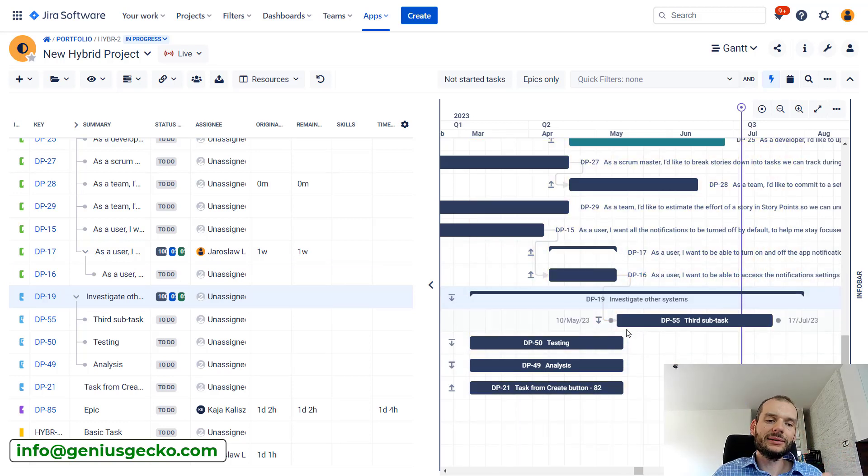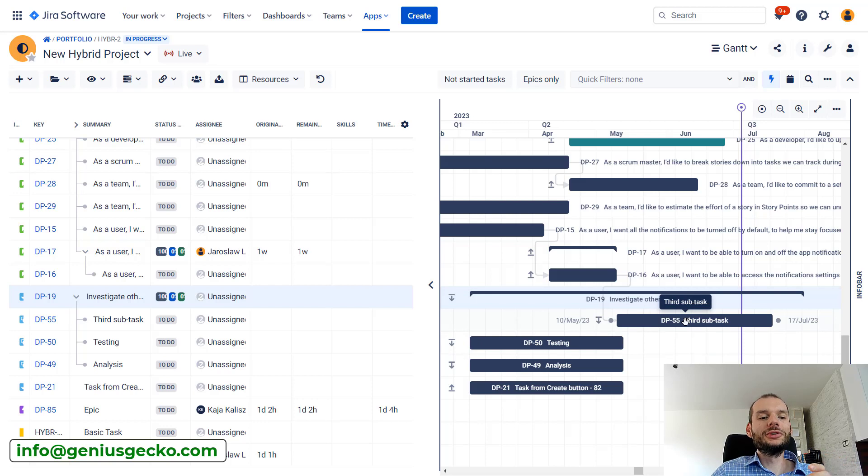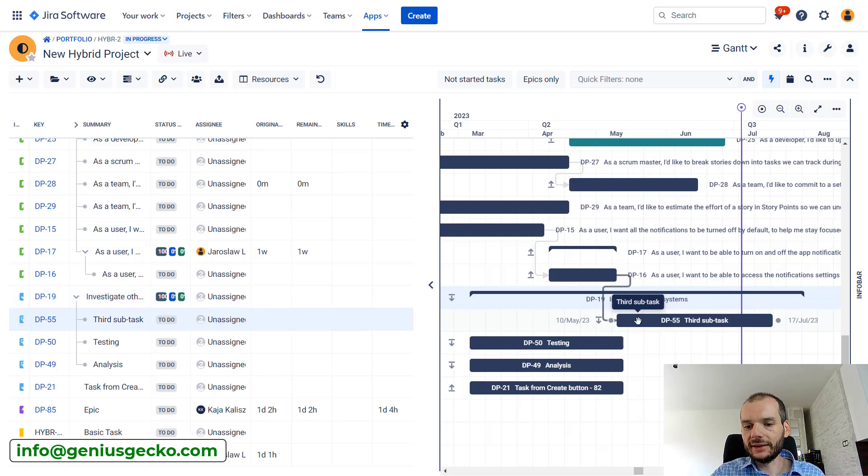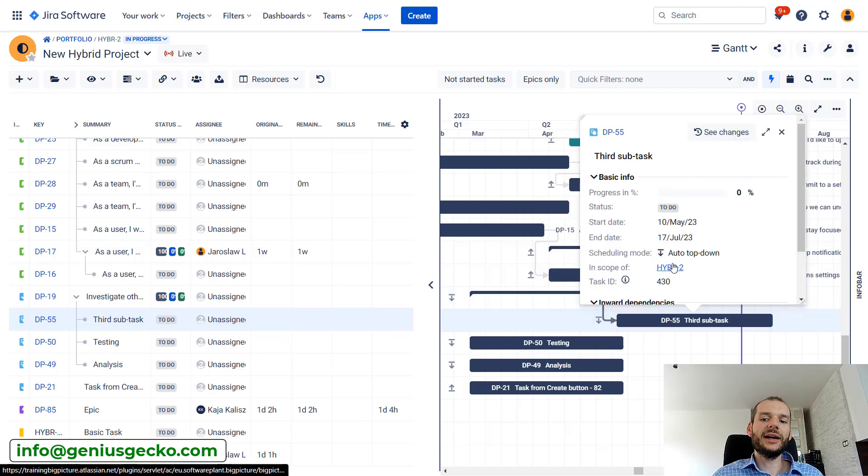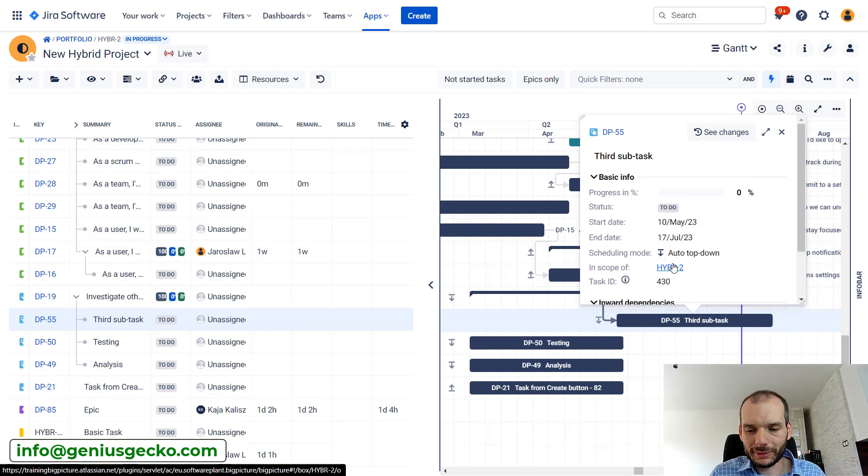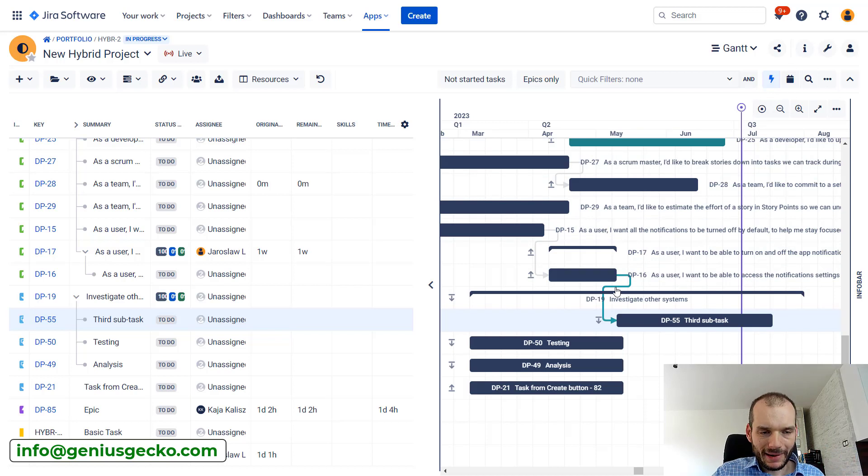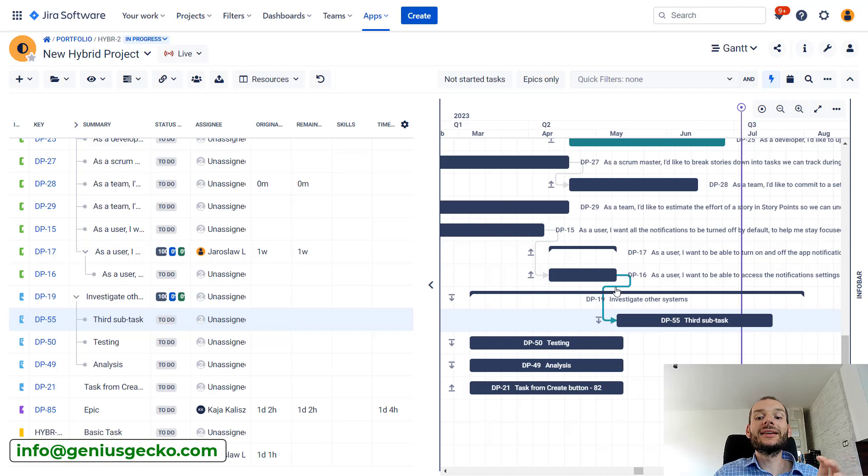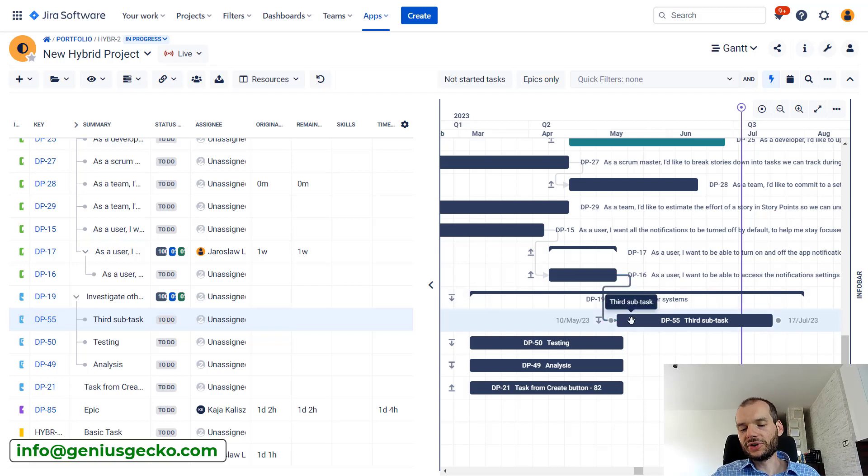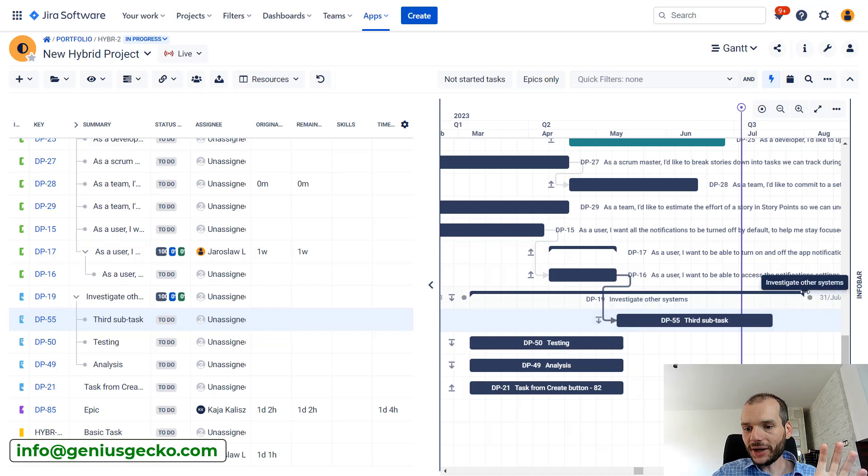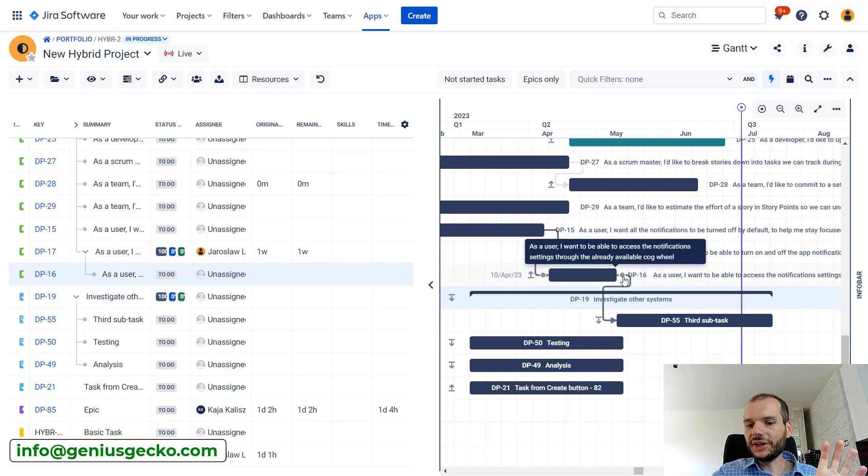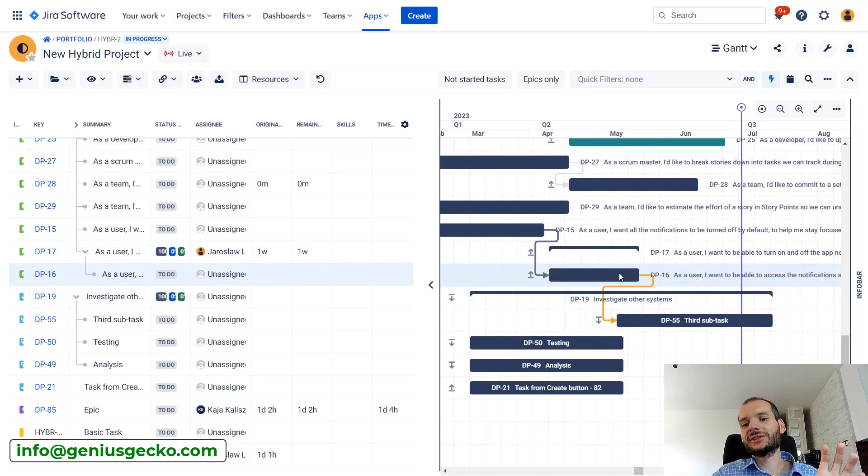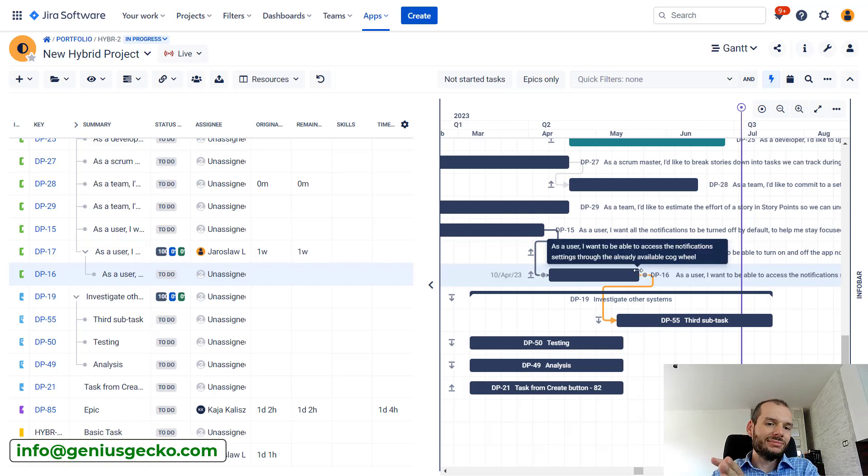You see that Big Picture automatically is able to move the task. There are actually way more reasons why this task cannot be moved. It could be in multiple different boxes and we could check that by clicking on the task itself, and we will see in which box it is located. If it is located in multiple boxes, it might be blocked by something in other boxes. So it's really important that if you see a yellowish dependency, you need to take a careful look and decide does it affect your plan, or maybe it's some kind of quirk that's not really impacting anything. But very often it will require your intervention.